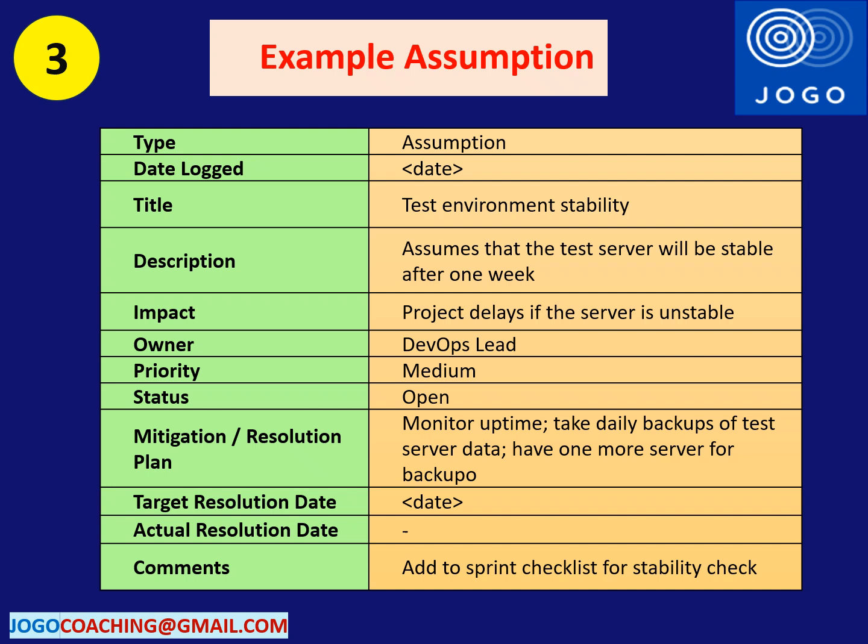The resolution plan is to monitor the uptime of the server, take daily backups, and try to have one more backup server. One more action taken is to use this checklist to validate the server stability. Hope you understood this assumption example now. Now let's understand the next example.